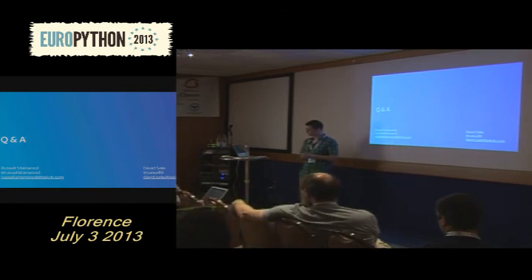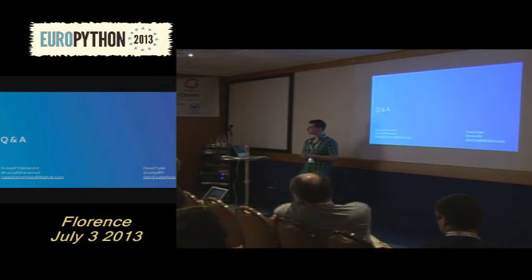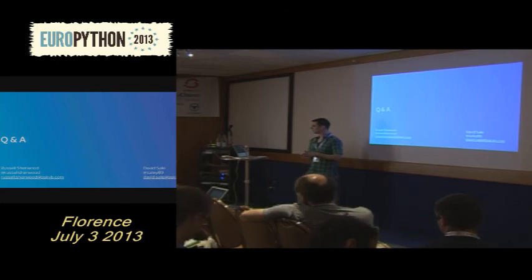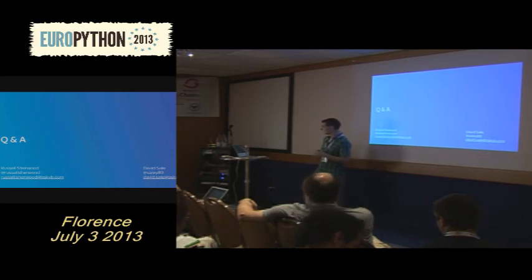I'm saying that you cannot always pretend that people get up to date with your latest releases. Sometimes you are forced to have specific releases at a certain time just because a certain hardware is coming out at a certain time, and you have to be there at that time. And you have to provide the next release in 6 months from now just because the next hardware will be available at that time. That's something that happens. You have to deal with that: your release times are fixed and constrained by something else, not just by your development. And you cannot simply say every 2 weeks I provide software to my customer base, because your customer base will not receive it.